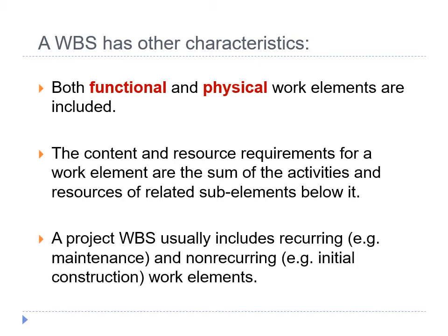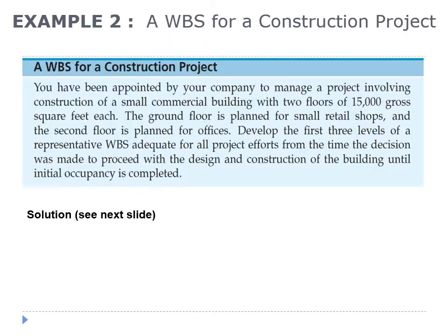below it. A project work breakdown structure usually includes recurring and non-recurring work elements. An example of recurring work elements is maintenance, and an example of non-recurring work elements is the initial construction. This is one example of a work breakdown structure for a construction project.